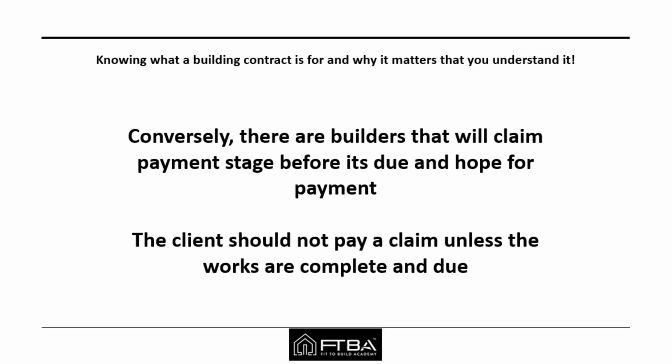where often clients will then pay the builder to keep on good terms with the builder. However, if you do this, you run the risk of paying the builder for works that are not yet complete. So for example, if you're paying for lock-up stage and the builder's claiming it early and there's no windows in or there's no doors in, well, you're clearly not locked up, so you shouldn't be paying.